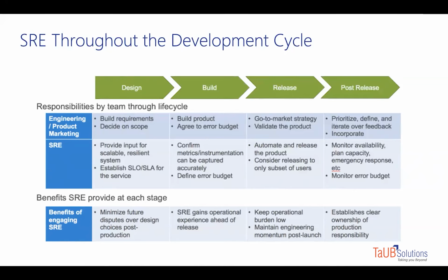Yeah, I can add some more input, Suresh, on top of it. Muthu, what happened is, in my previous engagements, there are some projects where I think we did not involve the SRE guys at the beginning stage of the project, and we engaged them at a later stage, and it was too costly for us. The reason being, people had developed applications which are not highly reliable, not highly available, and again we had to rework, and it became so costly for us.